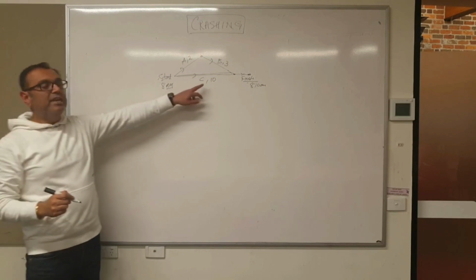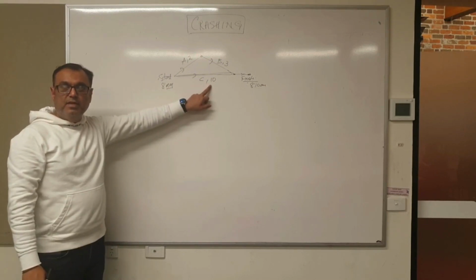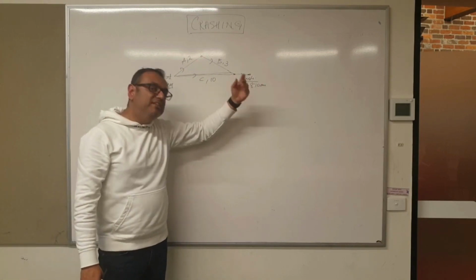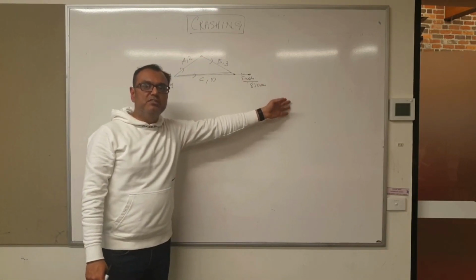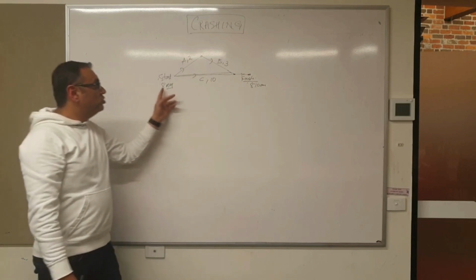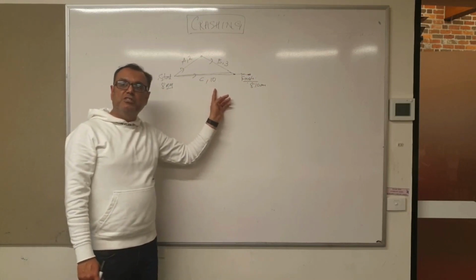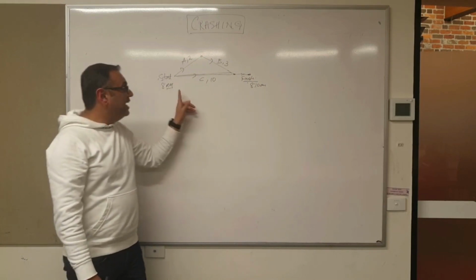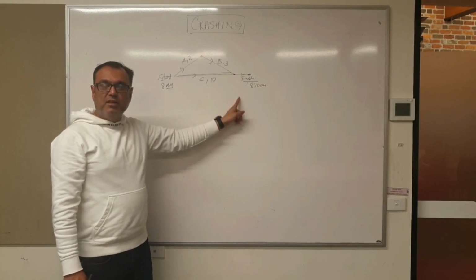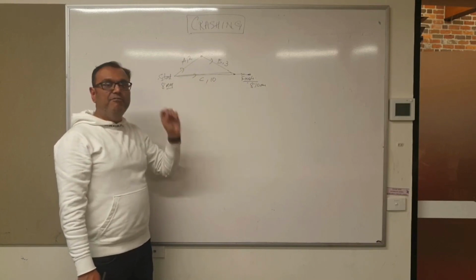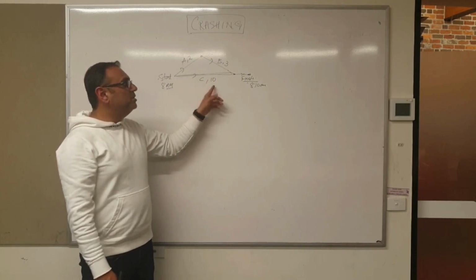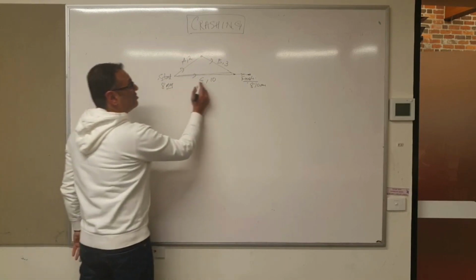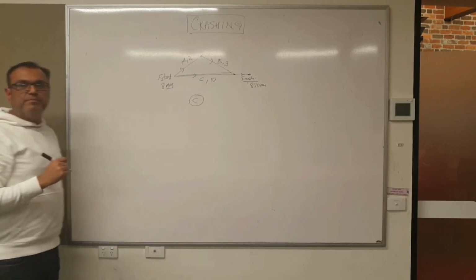That means you cannot delay C. If I say delay C, that means at 8:10, if he doesn't go out of his home, he misses his bus. So if he delays eating his breakfast by a minute more, he misses the bus, correct? So that is the critical path, where you cannot delay even a single second. The moment you delay, the project is gone for a toss, right? So C is the critical path.